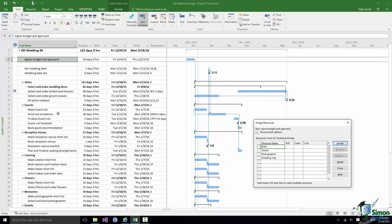I'm going to assign the Bride and Groom to this task. I'm going to work on the principle that the Bride and Groom are arranging this wedding themselves. I appreciate that in many situations it will perhaps be family members or other relations or friends that will be doing some or all of the organizing, but I'm trying to make this not too complicated. To assign a resource all I need to do is select that resource. In this case the Bride is already selected and then click on Assign.